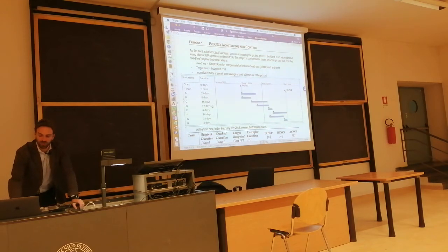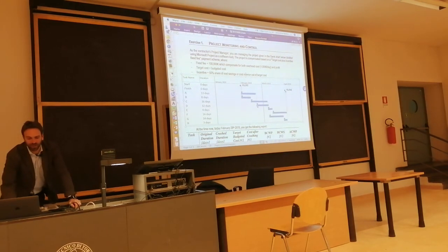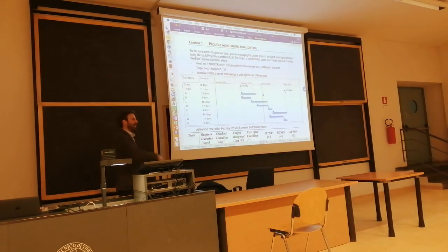So it's 12, and the duration of D should have been how long here? 13 days is A. D has not started yet. It's because A is finished now at the end of February. And tomorrow we can start D.